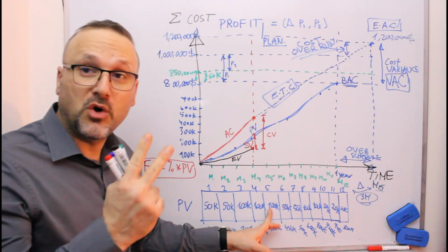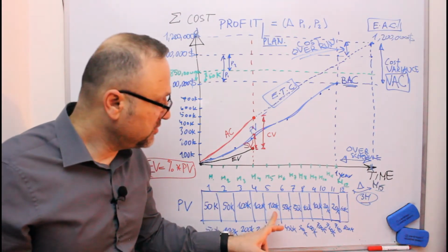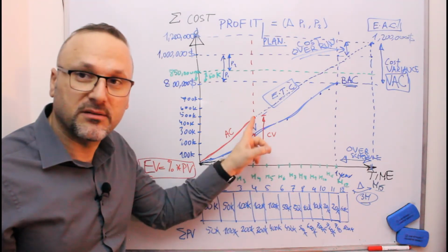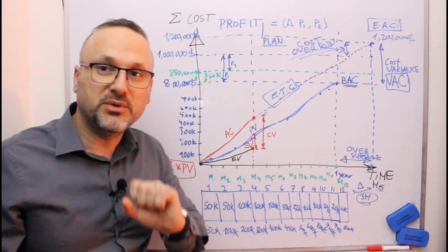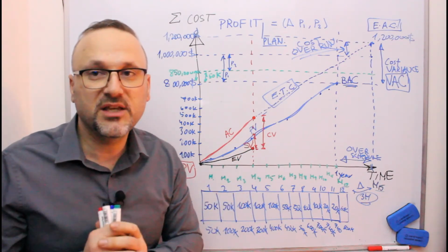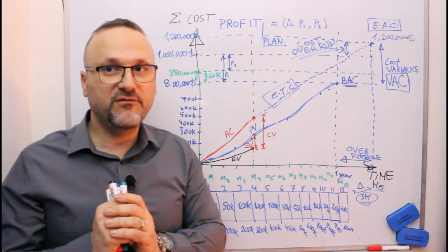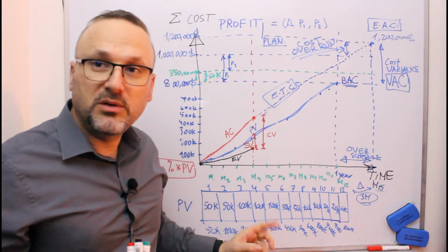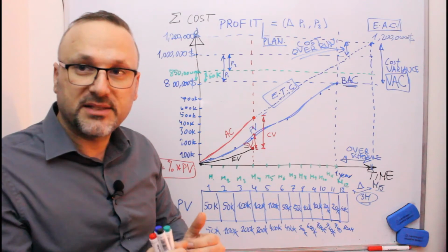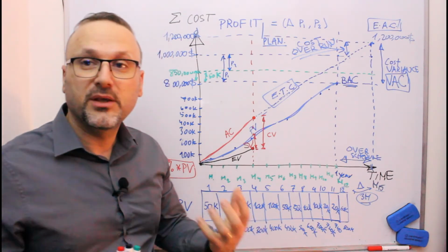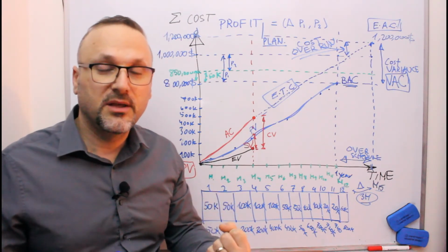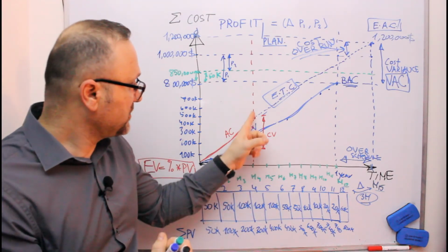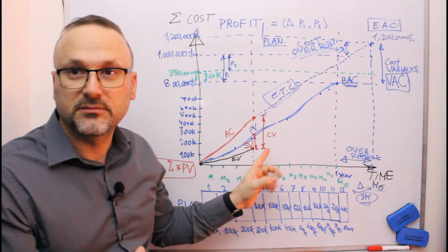Now, you have two options. If you take more than 100,000, you don't have the money. You will be facing problems with paying your invoices to your suppliers, and you will be in trouble step by step, because the company will tell you, you asked for 100 and we prepared for you 100, but now you are taking from us 200. That is wrong.